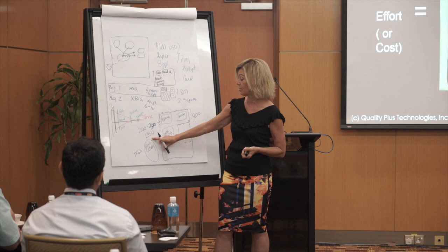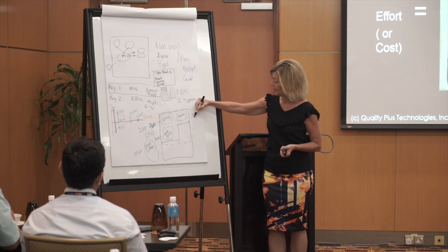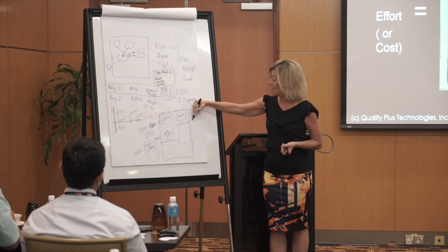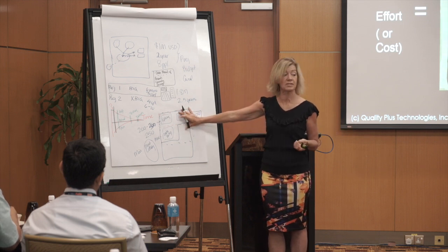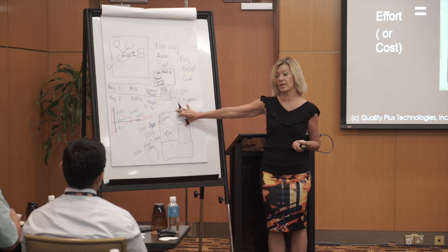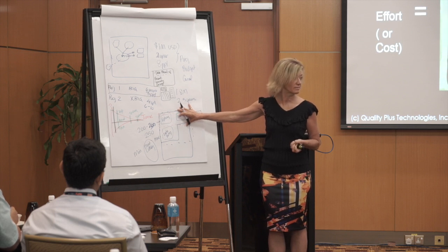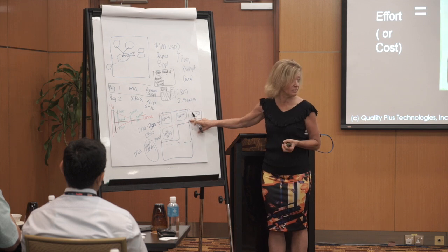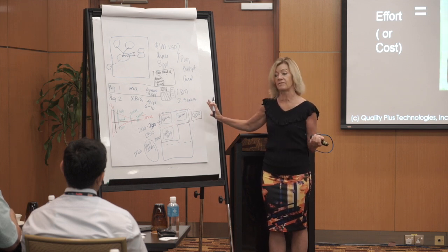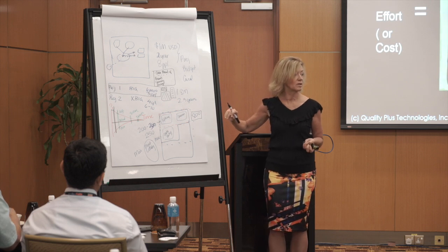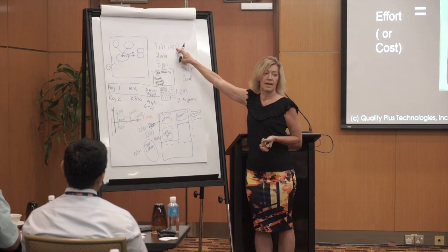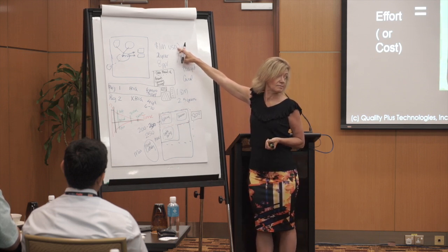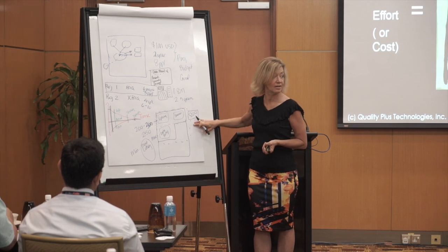So what you can do, and this is what governments are doing, is say, we think it's about 800 function points. At an average cost for this type of system, we're going to charge you $1,000 per function point. So an 800 function point project at $1,000 a function point, we will give you $1 million as the top price. But as you deliver, we'll pay you.